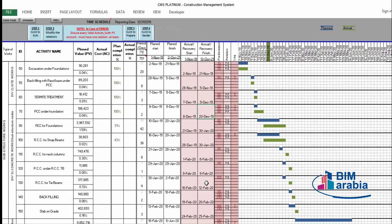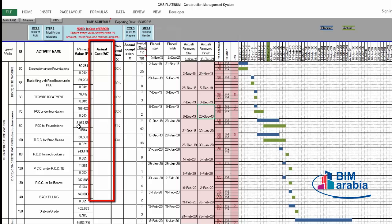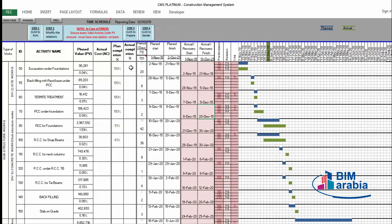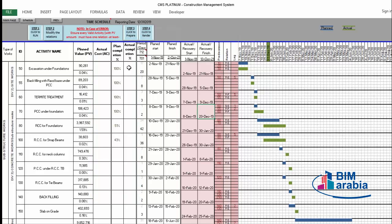To make proper project management and confirm your performance, you must have the planned value — not only for the activity, but cumulative up to today, up to the date of the report. You also need the actual cost to date and the earned value to date, which is related to actual completion. When these three pieces of information are available, CMS will make a full project management report with all required KPIs and performance indicators.